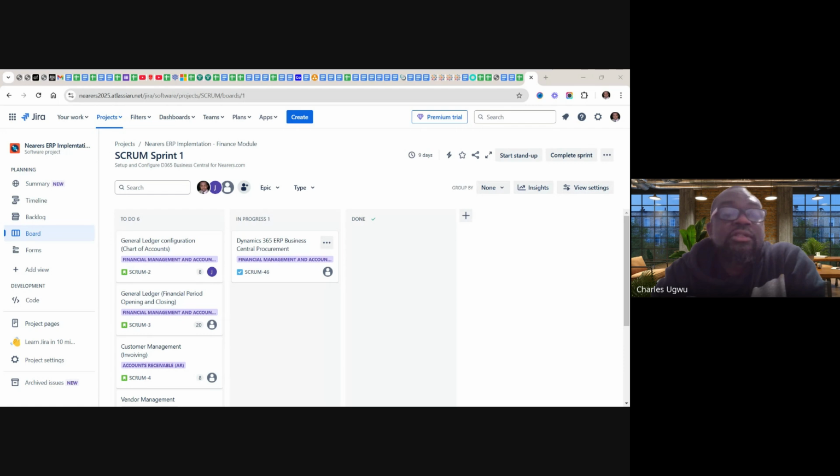Tasks are other things you need to do to get the job done. Like in this case, we need to get a license. You need to buy a license. It's part of the work, and if you don't buy the license, the work cannot be done. Another task can be if we need to do some work in this particular environment. For instance, we need to create more items here.